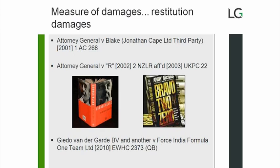A restitution measure of damages is intended to restore to the victim of breach of contract the benefit that the defaulting party has gained. There are two circumstances in which such a remedy may apply: first, where there has been payment of consideration but no consideration given in return; and second, where the defaulting party has profited from the breach even though the claimant has not necessarily suffered loss — sometimes known as unjust enrichment.